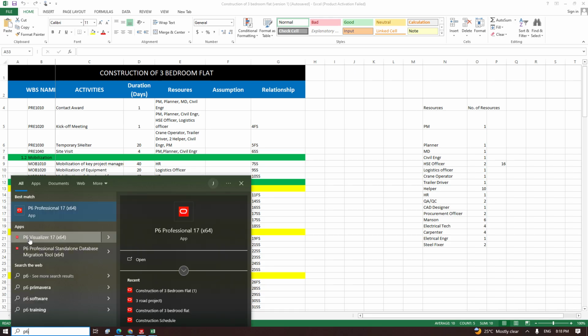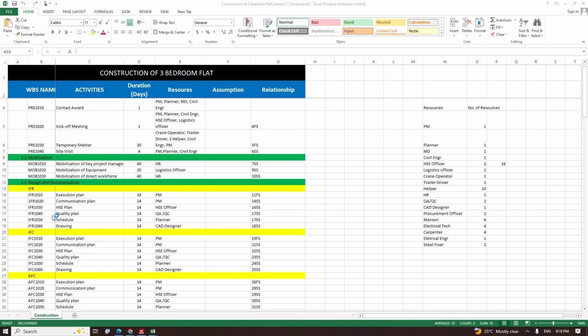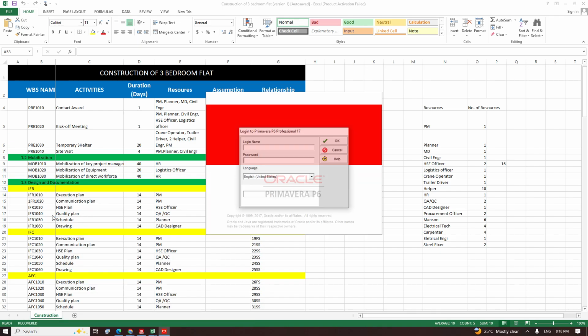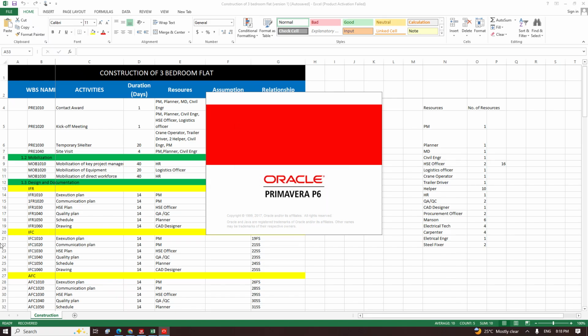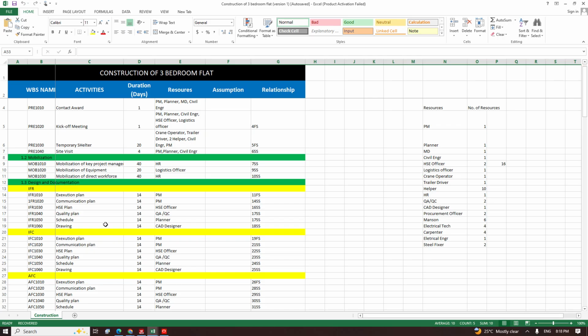there's what we call resource leveling, right, and resource smoothing. And we also take a look at it as a planner. As you are resourcing, your eye must always be on the resource spreadsheet so that you'll be able to know if your resources are aligning or if you are overloading them. When we mention overloading, we simply mean giving the resources more than what they can do.